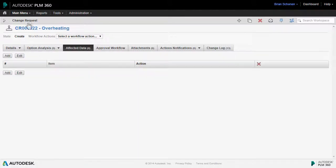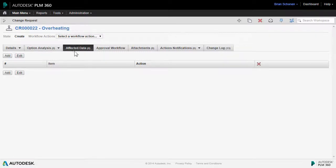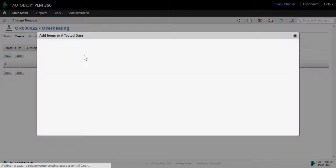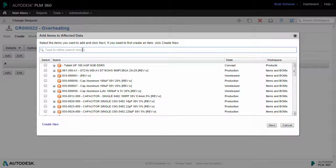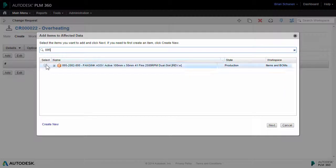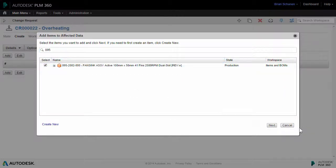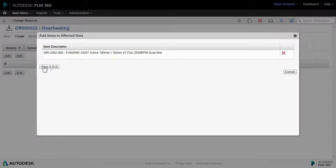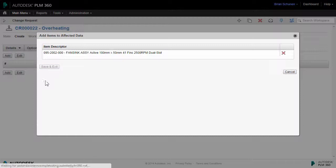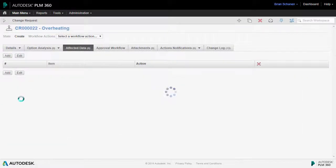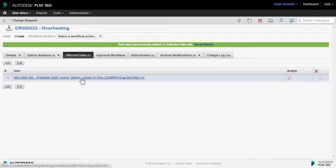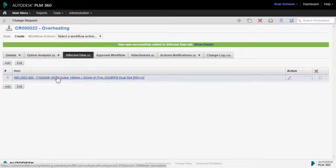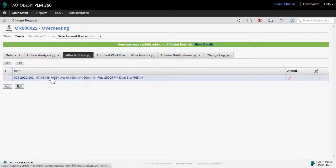Within the change request workspace, we have a tab for the affected data. So on the overheating issue, if we want, we can actually go out and identify and call out the exact affected component that we're going to need to resolve an issue with. And I'll save that down. Now this will become important later on when we go in and we do an audit or we go in and interrogate this particular component and see how many change requests or change orders or problem reports that were called against it.